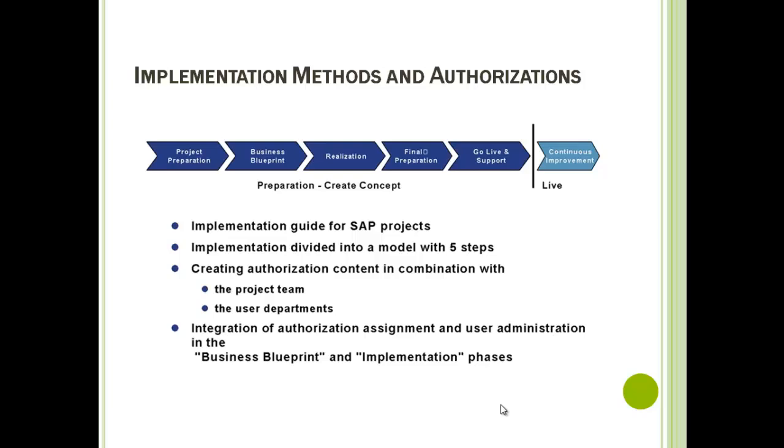The next one will be the very important one, the final preparation. During this time we will be testing all the roles, and we need to train the users on what the roles are and what they are used for. Then we will also do migration of business data into our SAP system. The next will be go-live and support. During this time we will be realizing our entire project in our SAP system, which will show the benefit of our implementation project.